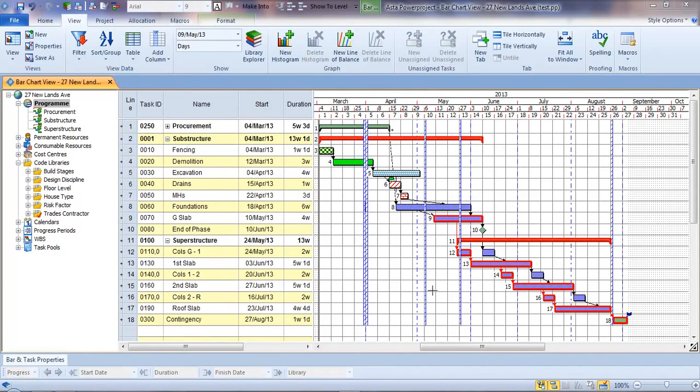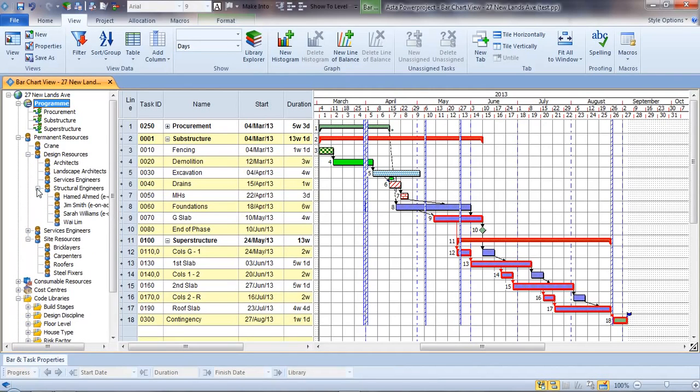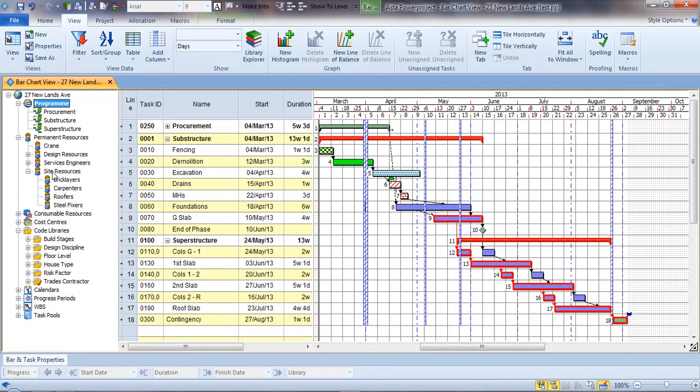So once we have the activities, then activities can also have resources and costs assigned to them. And resources are different to the colour codes which were shown, which are just responsibility codes. In the resource library, we can have different resources, and these can be hierarchically arranged. So you can have parents and children in this library, which greatly simplifies the list. And the folder level is also quite an important concept about skills.